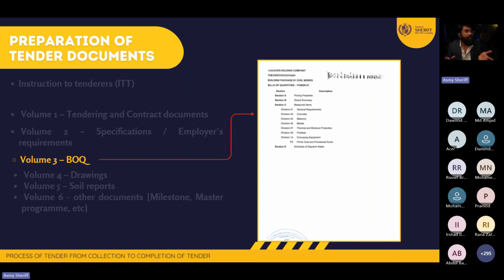So how are you going to come to know that by seeing the drawing? Oh, this is 2 million, this specification 10 million, so 12 million. Is that how you're going to come to the number? So what you need to do, in your drawing as well as using your specification, say we have 5 motors, this motor from Germany, that motor from Japan, and this motor is 10 kilowatt from Spain. I'm going to list down motor number 1, motor number 2, motor number 3, what the requirements are and how much it may cost.